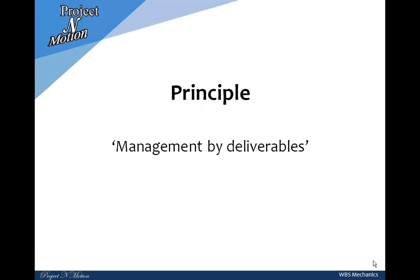The principle of WBS is management by deliverables. Consider an example of a book writer to understand this principle better. When starting to write a book, an author classifies his topics of discussion into chapters, then chapters into subtopics, and if required, classifies them further. Similarly, when planning a project, WBS classifies your project according to the nature and requirements of different works.